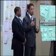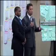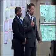What that means is it's a little bit of extra cost up front if electrification gets delayed, but of course it's a huge cost if we would have to come back with electrification, jackhammer it out, and design something. So we are incorporating that. The second thing we're doing as part of this is, of course, we're going to ground everything on the station as metallic to make sure that when we do electrify.